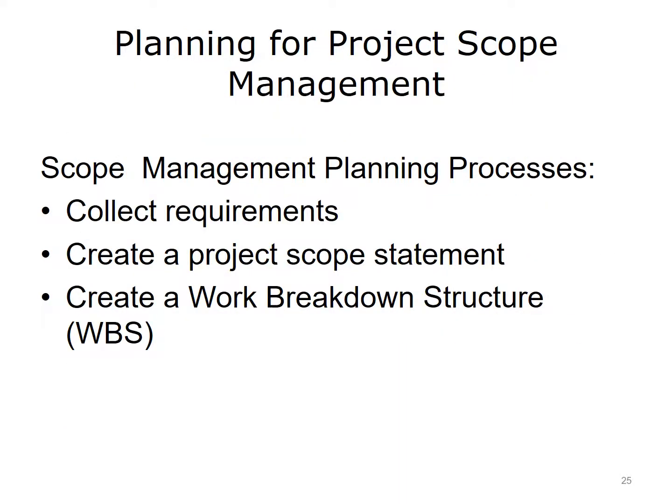During project planning, the team works to clearly define the project scope by collecting requirements, creating a scope statement, and defining a work breakdown structure. Information regarding project scope is obtained from the project charter and from project stakeholders. After creating the work breakdown structure, often referred to as the scope baseline, the scope boundaries are established.